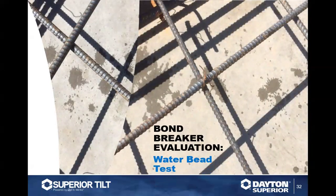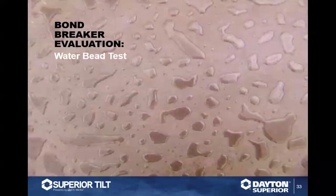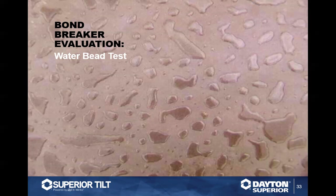Biggest problem with this section right here is the contractor now has to remove that rebar cage to reapply more bond breaker. So we want to make sure that you check before you start putting your rebar cages in. You are going to make sure your water is beading. I always check this before I put my rebar cage in, and I check again before I'm going to pour concrete, because those two can change between that, especially if it rains out. So you may have a slight change there.